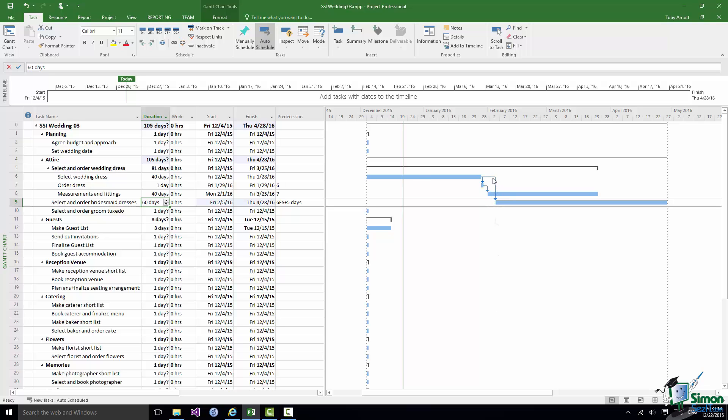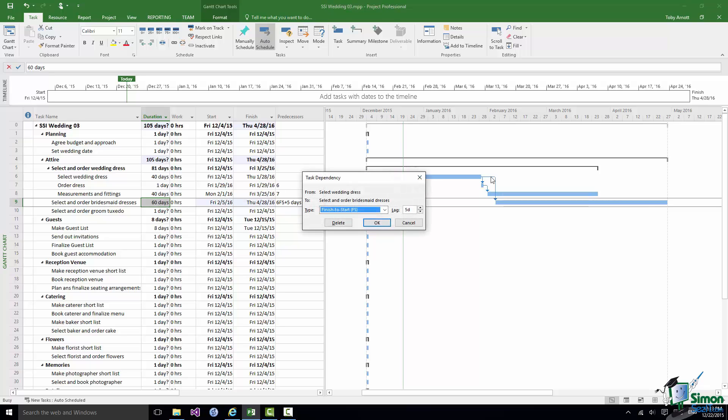And I could also have said let's have a lag of minus five days. Now what that is a negative lag we often refer to as a lead.